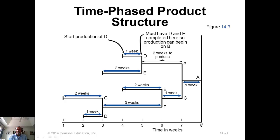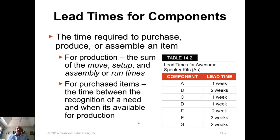The overall lead time is 7 weeks. If you simply add the lead times, you'll get 3 plus 5 plus 7 — 12 weeks. But in fact, the overall lead time is only 7 weeks because some of those weeks are done in parallel. You cannot simply add up all the lead times and say that is the overall lead time for producing the final product A.